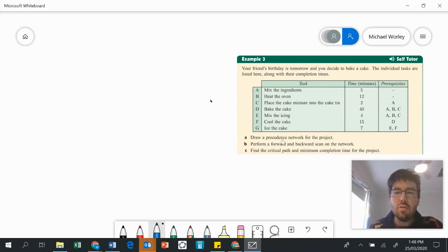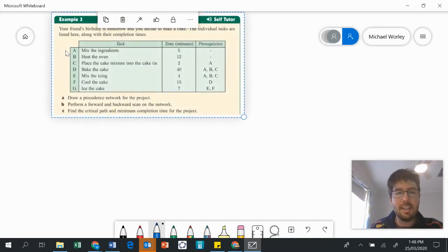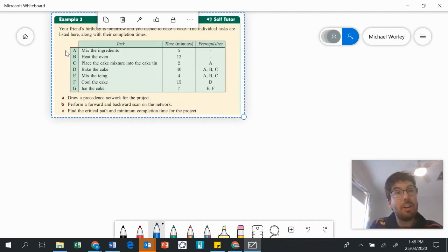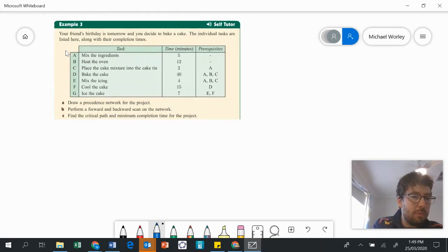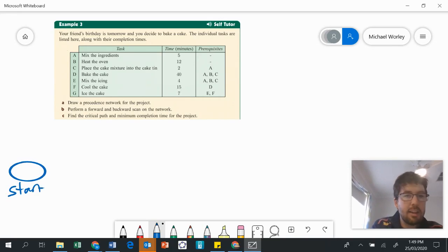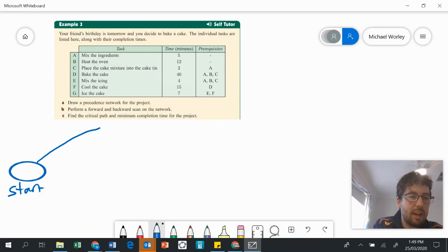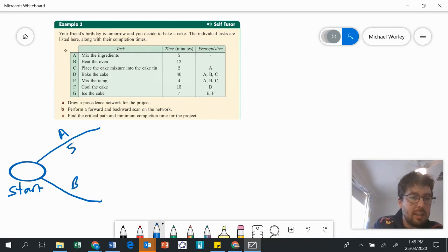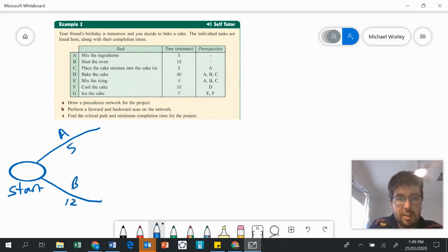We're going to need to firstly draw a precedence network for the project. As we draw our precedence networks, this time we're going to draw little bubbles. We're going to draw a bubble here to start — we're going to make this our start. Now at the very start, we can see that A and B are the very first activities. A takes five minutes and B takes 12 minutes.